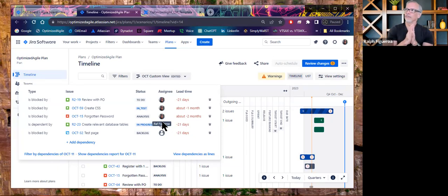And this becomes very valuable when you're doing sprint planning session. Let's say you don't want to refactor the code later on. Ideally, you want these dependencies, which are blocked by or dependent by, to be done. So you want to reach out to Ralph and say, hey, I would like to include this dependency in my next sprint. What's your plan of action? Right? So you can start having those conversations of timing.